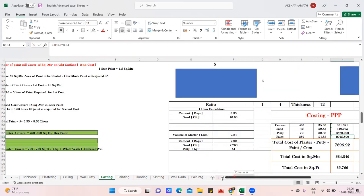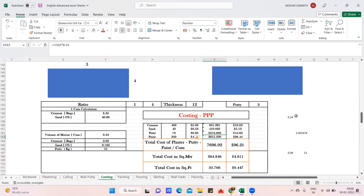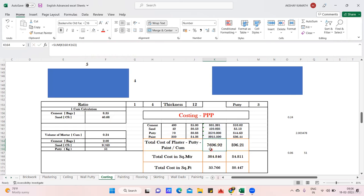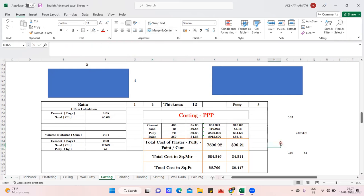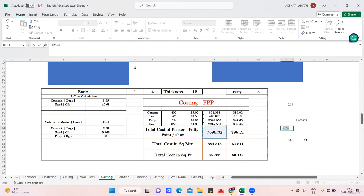Paint: 8.33 liters was already calculated, so 350 × 8.33 = 2,915 rupees. Converting to dollars: 800₹ = ~10$, 410₹ = ~5$, 3570₹ = ~44$, 2915₹ = ~36$. Total cost: 800 + 410 + 3,570 + 2,915 = 7,696.92 rupees, or approximately 96 dollars.